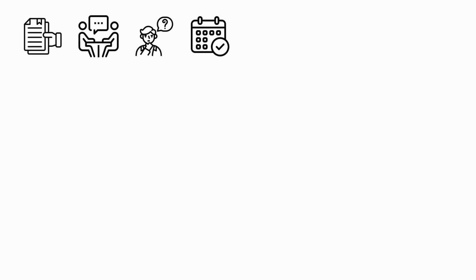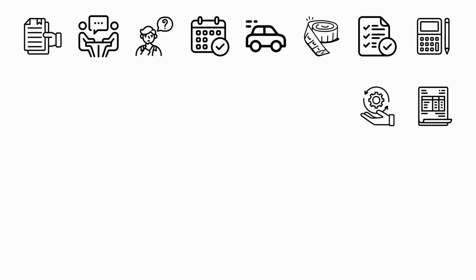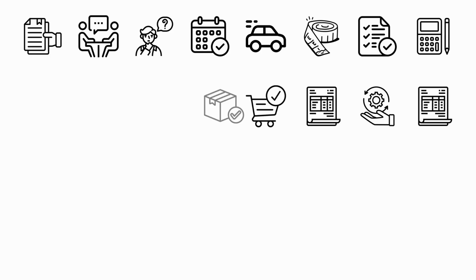The inquiry came in, you spoke to the customer, you asked questions, you arranged a visit, you drove to site and you measured up, you checked what was already there, you worked out the materials, you built the quote, and maybe the customer asked for a change, so you revised the quote. Then you ordered the materials and then went to collect the parts, loaded the van. That is all labour. It might not feel like labour because you're not installing anything, but the business is still spending time.